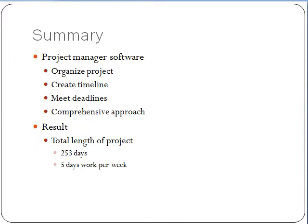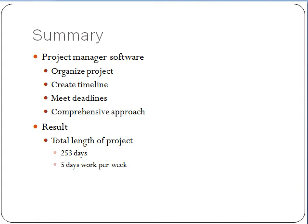Therefore, in summary, the project manager software is used for implementing projects as it serves a purpose to organize the project, help create a timeline, and meet deadlines. It serves as a comprehensive approach when it comes to implementing projects. For this particular project, the total length time of the project is 253 days in implementing the seven high levels that were presented above.